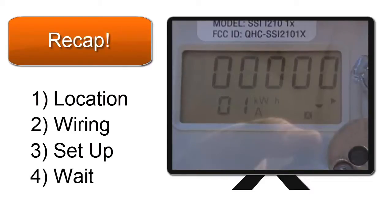Wait. Incorporate the 5 to 10 minutes that the boot up takes into your commissioning process. We understand that time is money, so we want to make sure that you are not wasting time. Remember to do this now so that you don't have to drive back later.